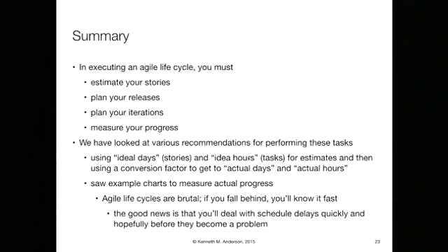It's human nature to want to say, okay, yeah, I'm done on that, and not get the story all the way over the finish line to the point where you can say, yeah, it's done. I was able to build it on my machine, deploy it to our GitHub. All of my team members downloaded it. They all used the feature, and it didn't break. It's done, right? And then you can move on to the next story, the next task, that kind of thing.